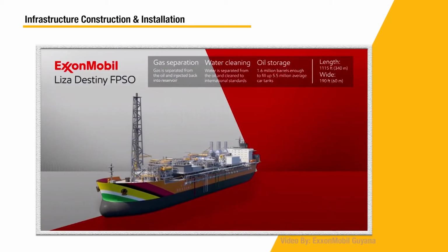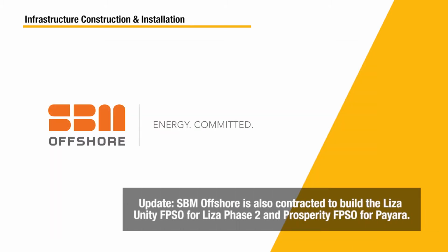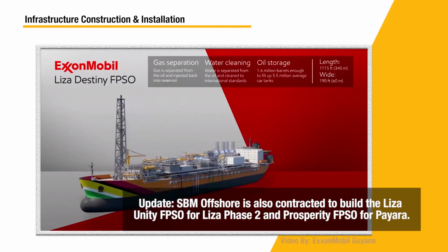Floating production units such as an FPSO, or floating production storage and offloading unit, are fabricated in specialized fabrication yards and then towed to the field, hooked up and commissioned. FPSO contracts for Liza Phase 1 have been awarded to SBM Offshore, a firm with expertise in floating production systems for the offshore industry. The technology, skills, and facilities required to construct an FPSO are not currently available in Guyana.